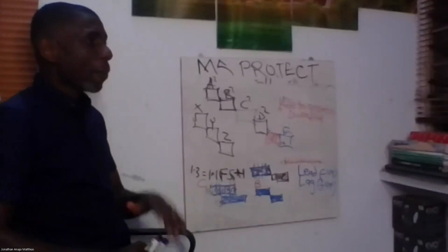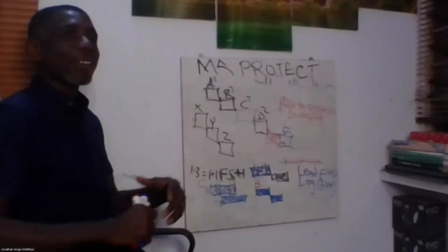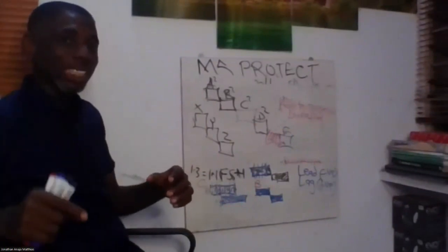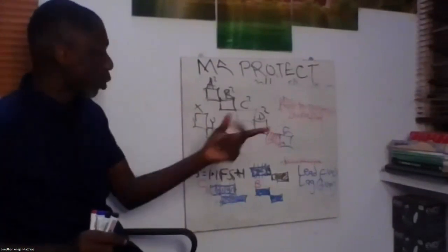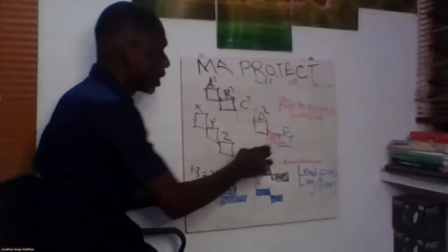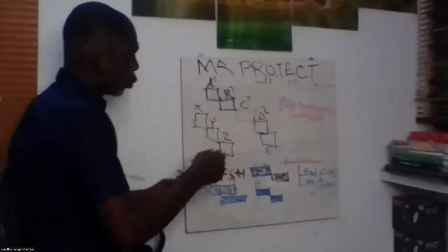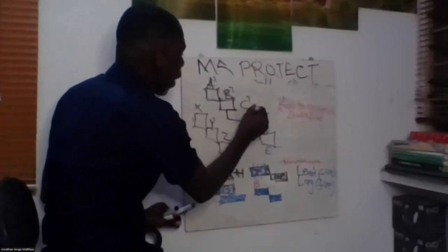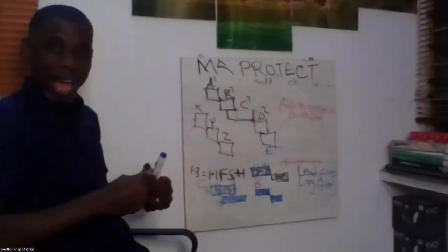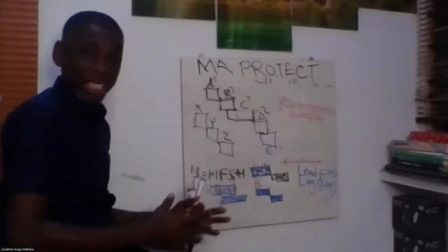Now, what I'm saying about lead is, if you want to advance a successor activity, which is applying lead time, it is best done and more useful to you when you do it here. When you do it here, it means that in a 10 days duration, maybe you apply lead on E, it has reduced it by maybe 1 day. You apply lead on C, you have reduced your schedule by another 1 day. Before you know, you have gained 2 days.